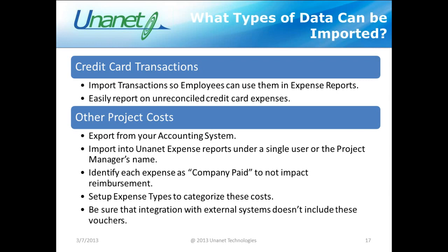Typically, we're importing that data into the Unanet expense template area, and we bring these expenses in as an expense report that's loaded under a single user account, like the administrator account or one of your project manager accounts. We would identify these expenses as company paid so that they're not impacting your reimbursement totals or any interaction with your reimbursement cycle, but they are there as a placeholder so that you can see these as costs on your project.